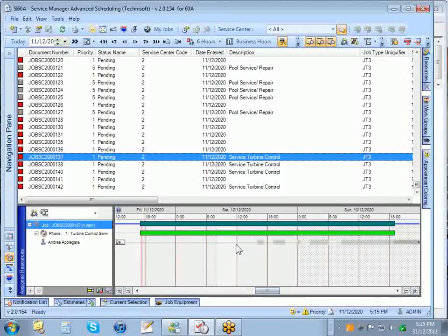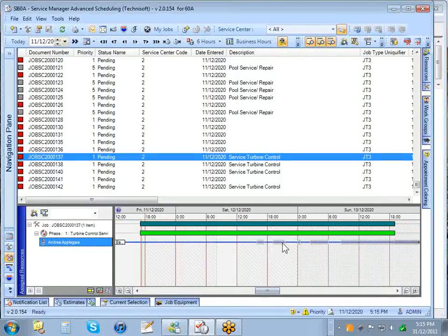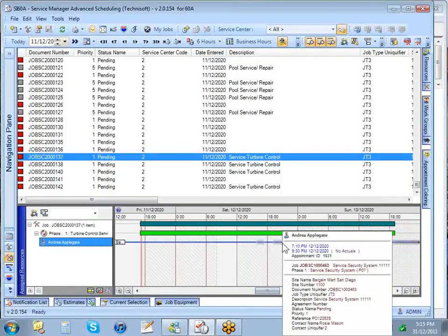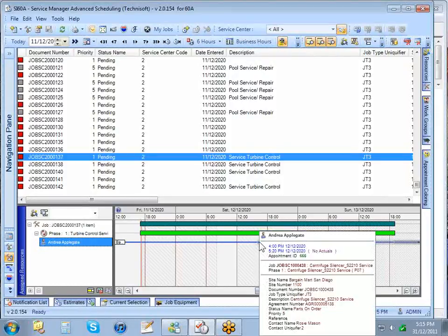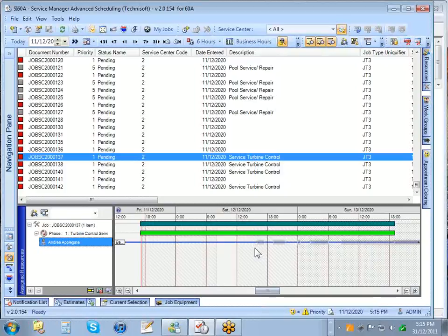The grey entries you can see here for Andrea, if I click on Andrea, these grey entries, when I hover over, we get a hover, and they indicate that Andrea is on a different job, 463 there, she's on another job here, 438 and so forth. So you can't accidentally double book Andrea because you know she's already on other jobs where those grey or ghosted entries are.